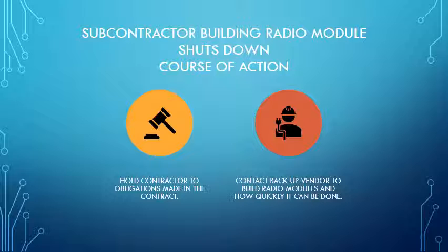Creating these additional buffers during the planning stage of the project saved us from having to crash the whole project altogether. We also offered overtime opportunities to production staff once new modules were delivered to speed up the production phase, but offered additional pay and time off to employees that volunteered for overtime hours.